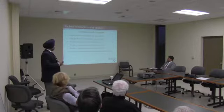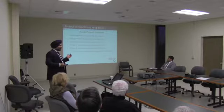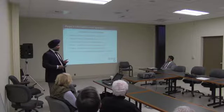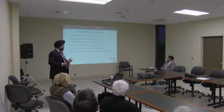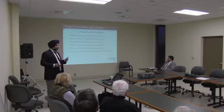So this is our project schedule. Looks like we started the planning, and the planning phase was completed in June of 2012. We then started the design. Design was completed in January 2015, and construction started July of 2015.